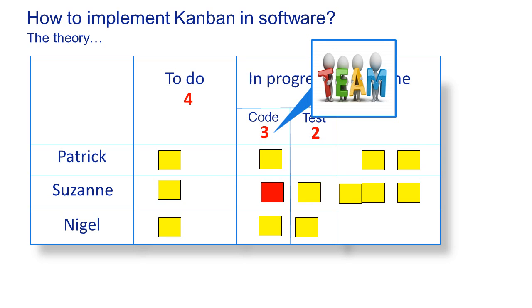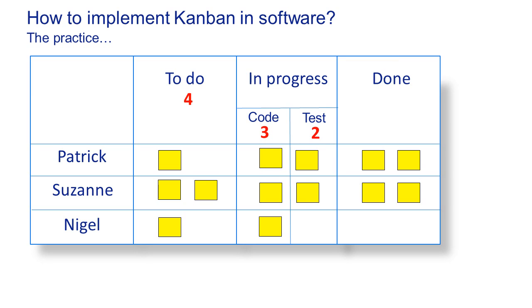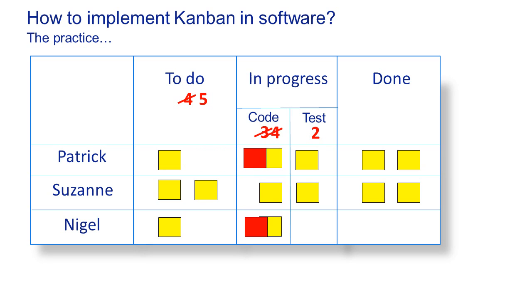In the meantime, the test column is now full, so they'll need to remove one item from there as well. That's how it works in theory. What I saw in practice was different. We had a high priority item in the to-do column with five items already, so someone said maybe the to-do limit is too low — let's put it at five. Then maybe the three under code is too low — let's put it on four. Before long, our work in progress limits became meaningless because we kept increasing them.